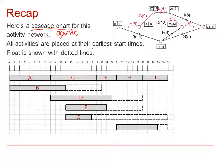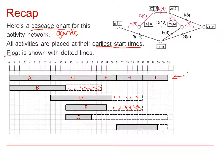All activities are placed at their earliest start times and the float is shown with dotted lines. This space here is known as the float. Remember that the float is the number of days that these activities can be delayed without delaying the whole project. Also remember that this top row here represents the critical path, so anything delayed in the critical path will delay the whole project.